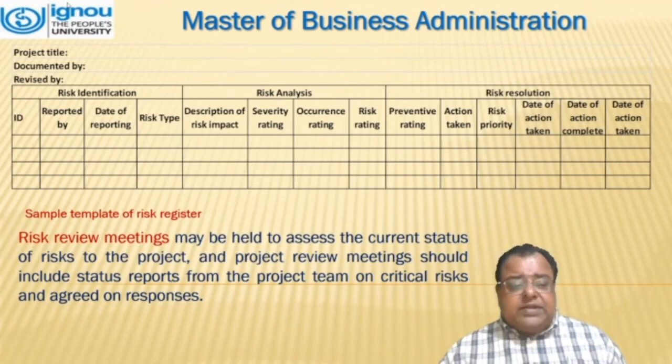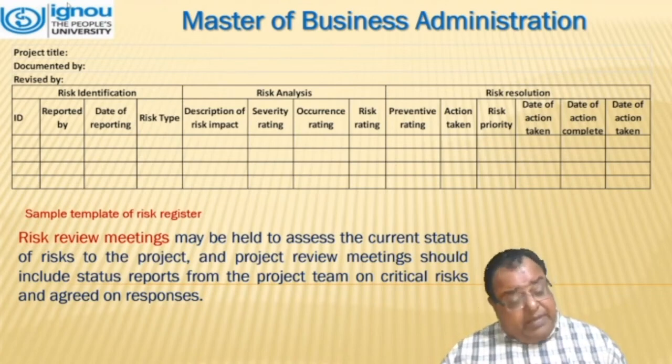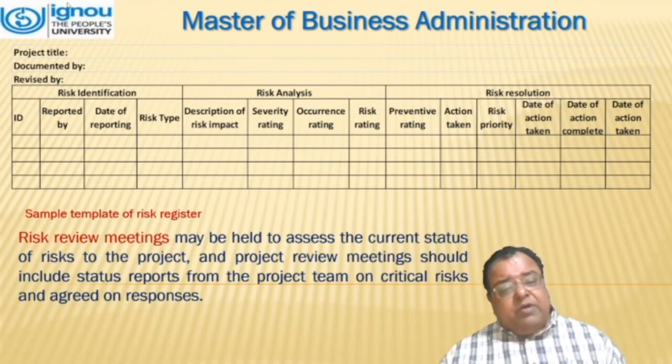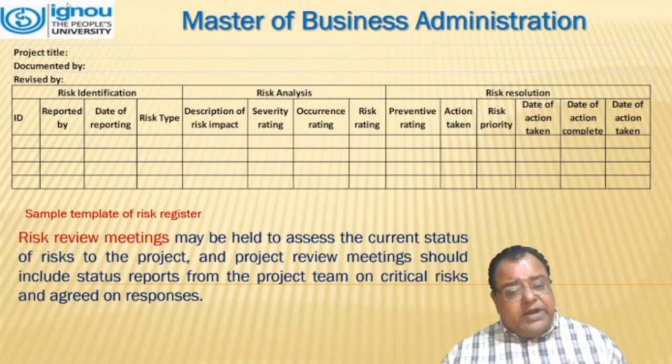Now, in risk review meetings, we assess the current status of the risk to the project. Project review meetings should include a status report from the project team on critical risks and agreed responses.